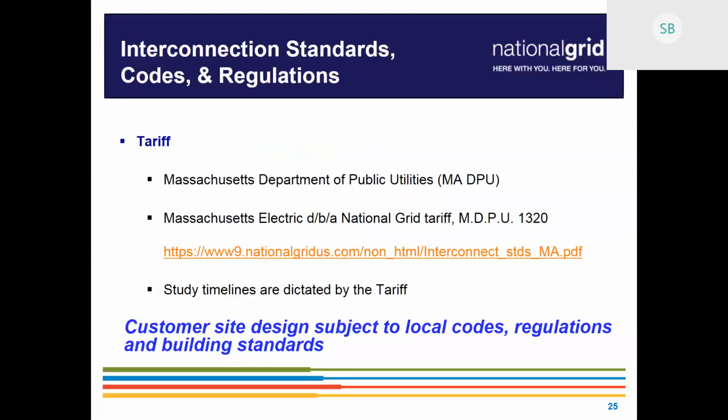Also, if there are any options we're considering, sometimes from our perspective, two different options are six of one, half a dozen of the other. One might take more time and be less costly. The other one might take less time and be more costly. So there might be some opportunity for seeing how you'd like to move forward. But for the most part, we're just trying to get you the major system modifications at that time.